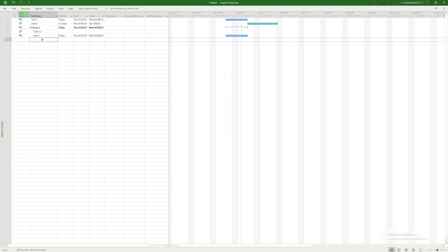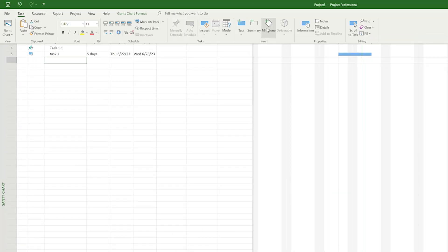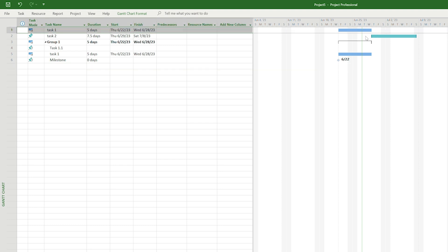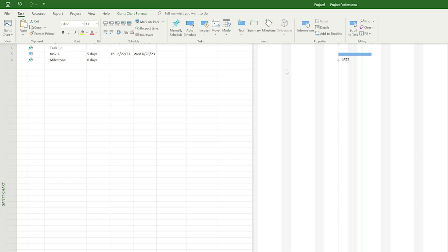With tasks and task groups in your project, it's time to add key milestones. Milestones can be important meetings, deadlines, dates, or deliverables. To add a milestone, click Task > Insert Milestone, give it a name, and make sure the duration is set to 0 days. To add dependencies — which Project calls links — control or shift click the tasks or milestones you want to link, then click the task menu and click the link button. All selected tasks and milestones will be linked. A link or dependency indicates that one task cannot start until the preceding task finishes; the default is a finish-to-start dependency.